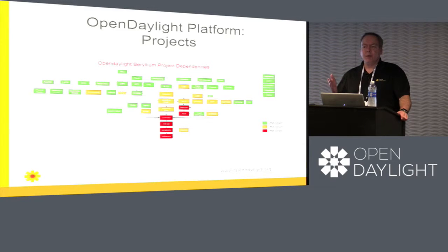We do this so that we can stage our release process, as features are first verbalized during the early parts of the release process. Again, offset 0 and offset 1 can say what they're going to provide, and then based on what they provide, offset 2 projects may choose to add or not add a feature because it would be dependent on something that would be new in an offset 0 or 1 project. So that way we can keep everybody informed, the dependencies in line, and throughout the release process have things ready for things that are going to be depended upon later in the cycle.